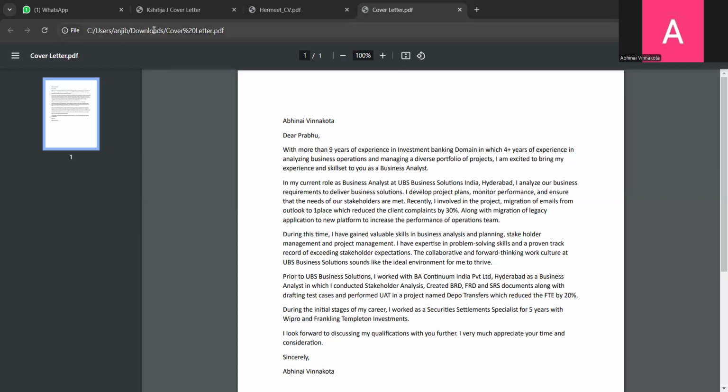After moving to the product backlog, we need to make sure of the definition of ready, meaning, do we have the exact acceptance criteria which will be accepted by the product owner, or do we have enough resources? Those will be taken in the first sprint.